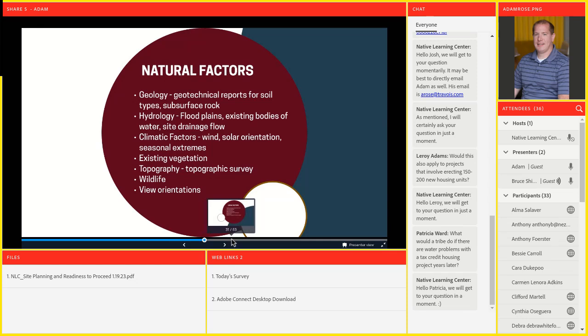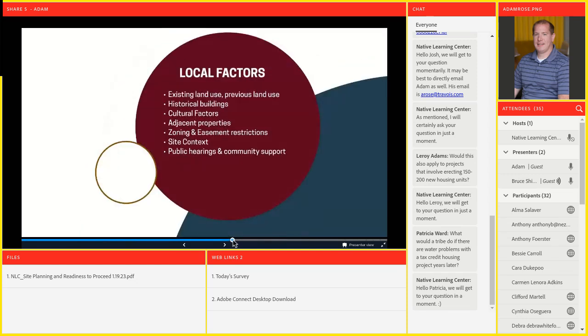Or once you get into construction and your site work contractors are out there with equipment and they start moving dirt and then find these concrete structures, they're going to charge you extra to remove them. Yep. And if there's potential for underground storage tanks, that introduces a whole other set of issues. So having a good survey done, having the title company do searches for easements, all the things that Adam mentioned, you just want to know as much about that site as possible and look back at historic documents.